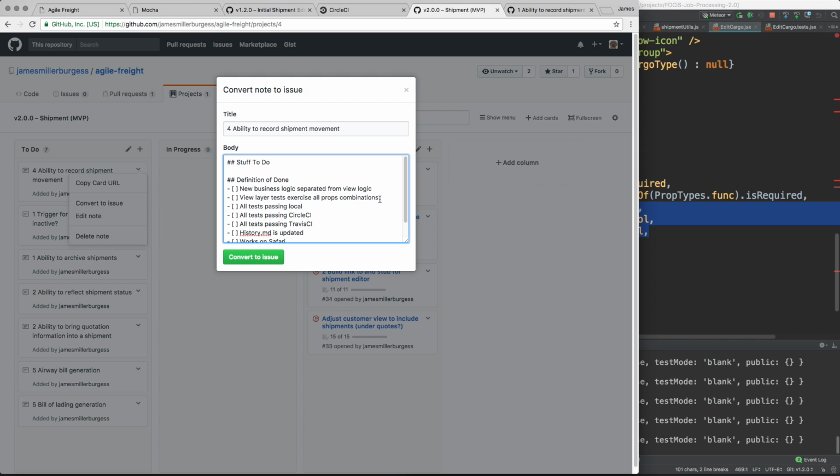Definition of done is really important for every Scrum team to have because it sets the quality bar. And you would expect that the definition of done gets stronger and stronger as the team matures, which means that their quality bar is going up. And so if we don't revisit the definition of done, there's always this risk that the team is not improving its quality bar, and